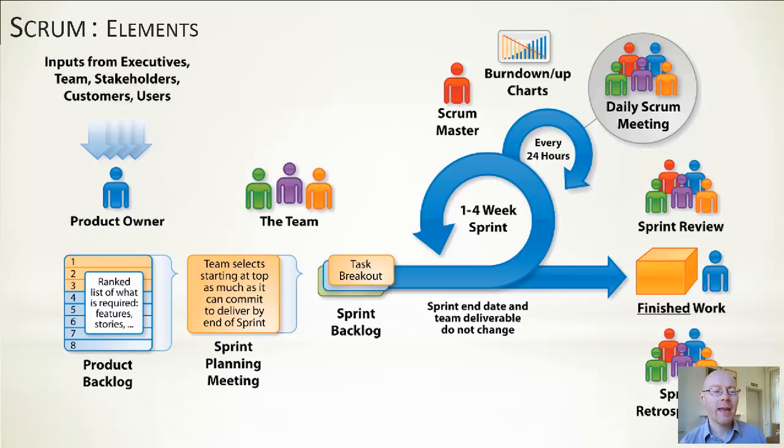The product owner is our main interface with all of the stakeholders, the clients, the people who are paying for it, the people who have an interest in it. The product owner liaises with them, understands their needs and their views, and is able to communicate that. Their main area is the product backlog. They get to decide all of the things that we might want to implement, and have a key function in saying which is the most important thing to do next.